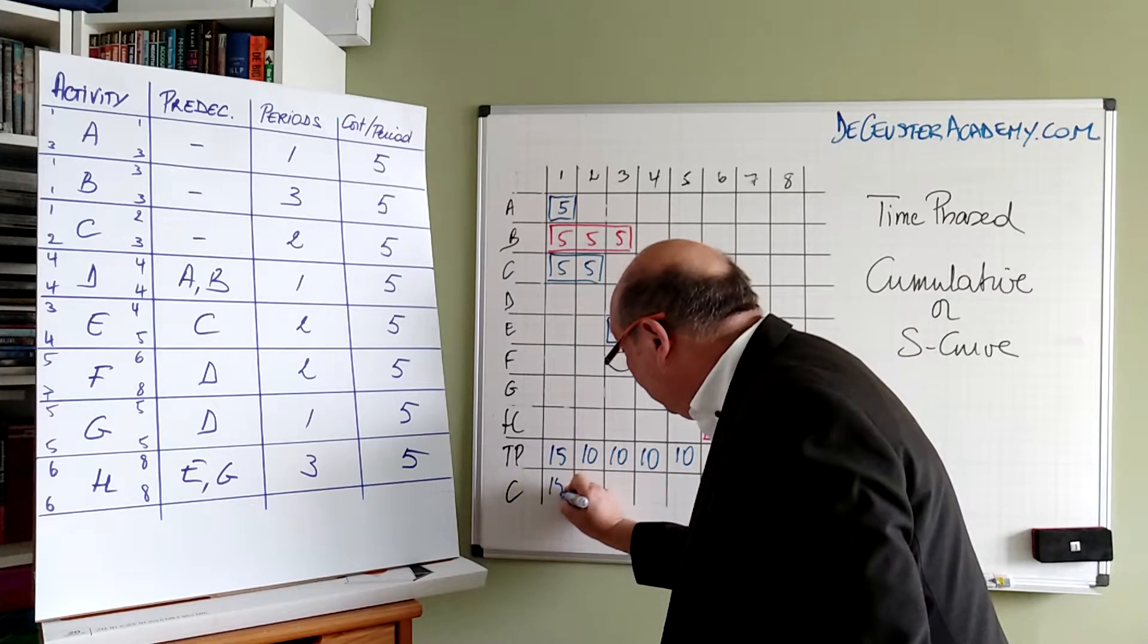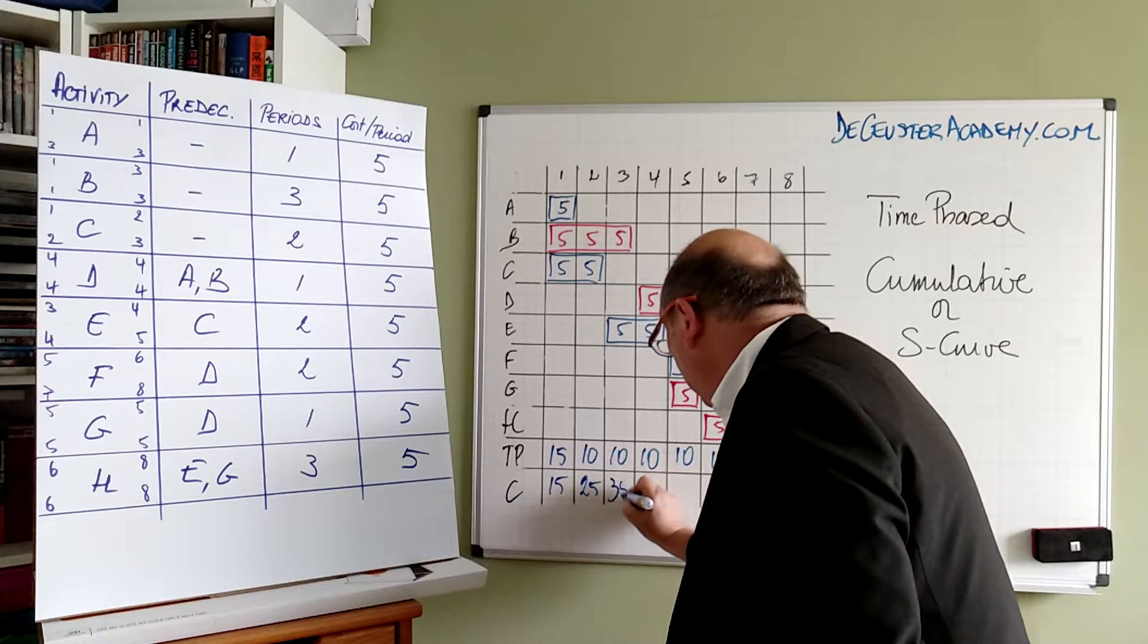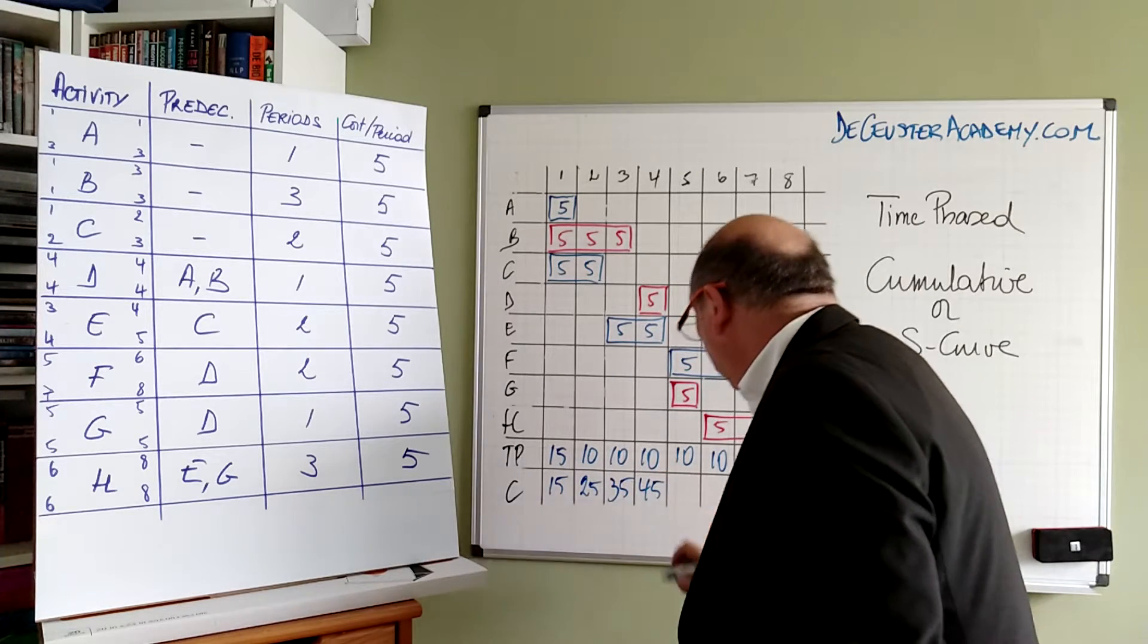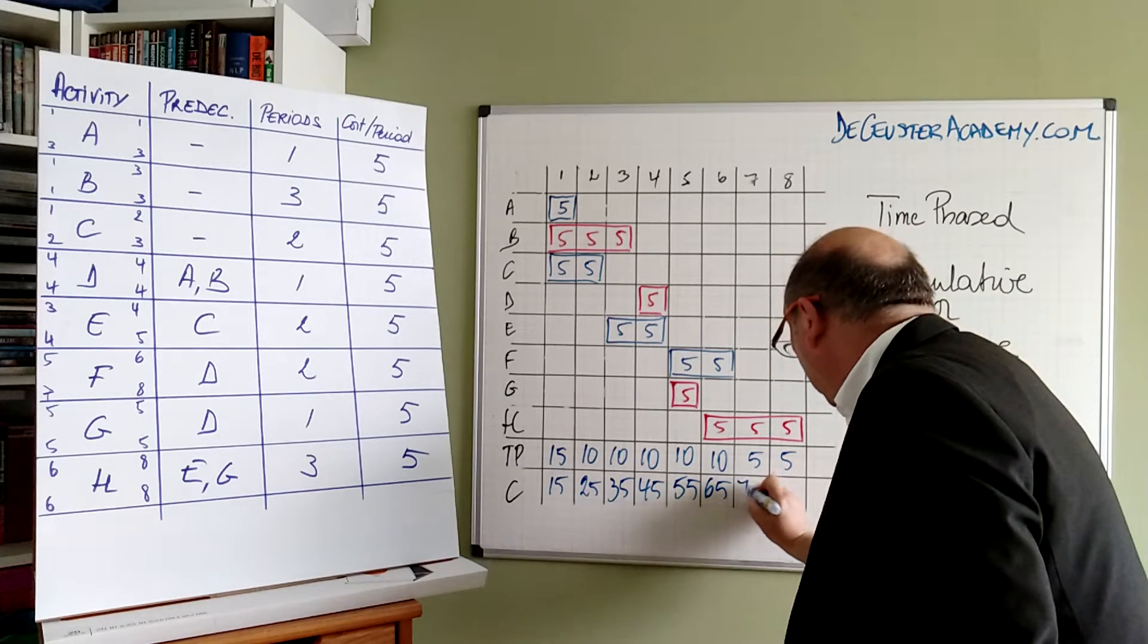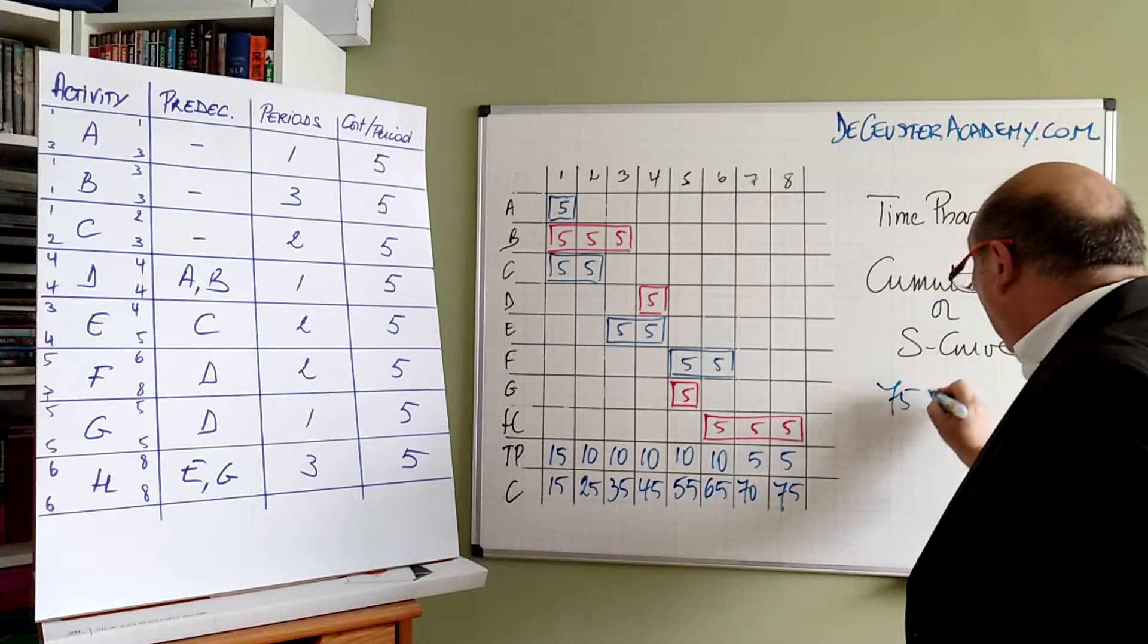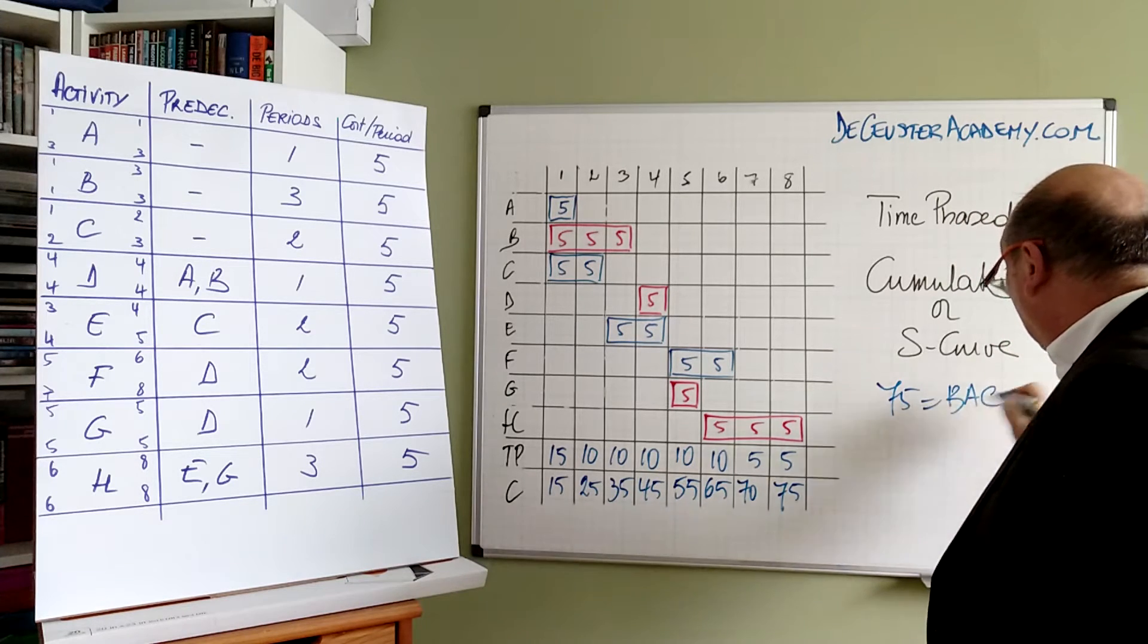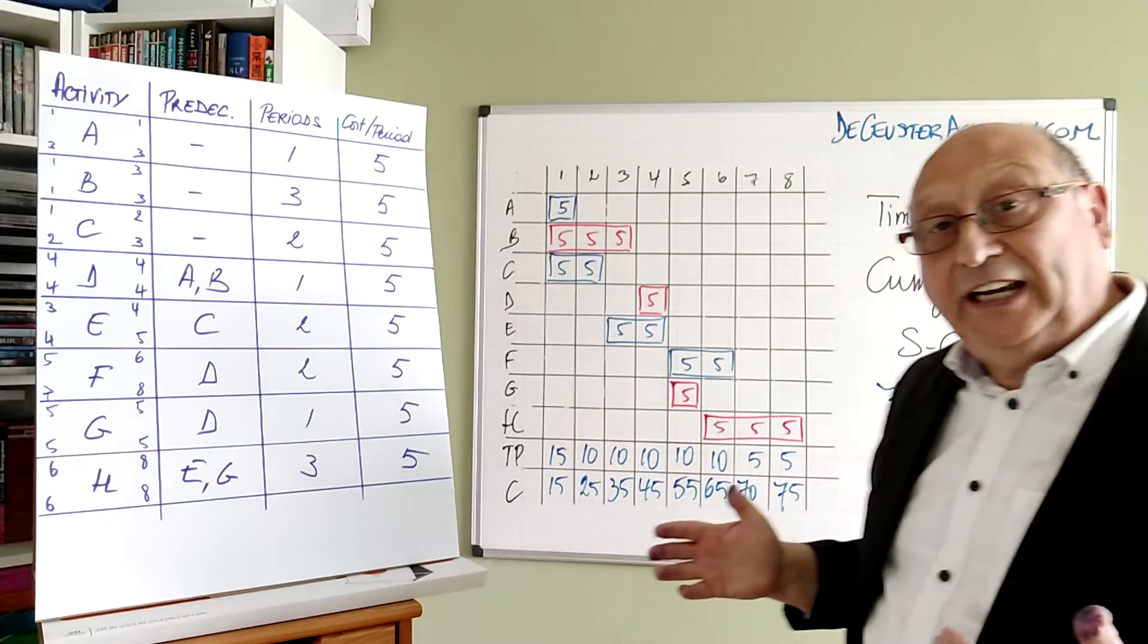So we have 15, 25, 35, 45, 55, 65, 70, and 75. And 75 is what we call the budget at completion. Now we can do the same thing for our project when we are in late start position.